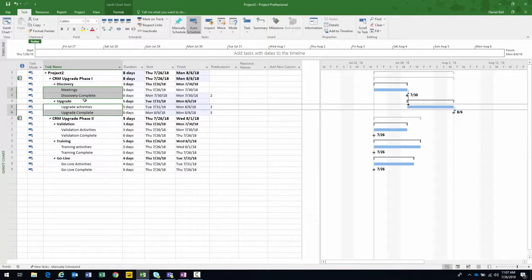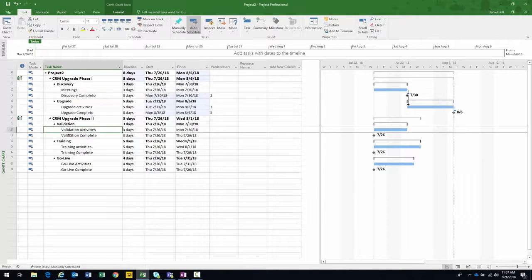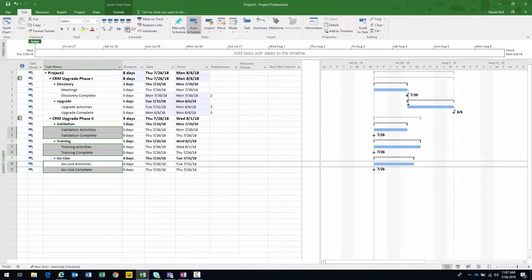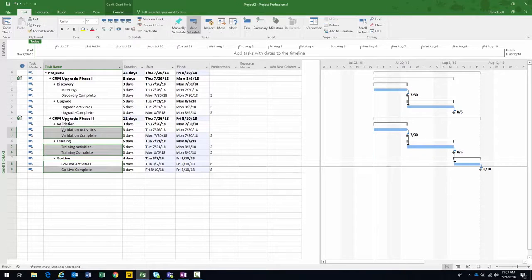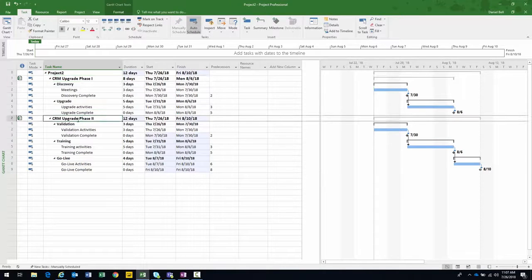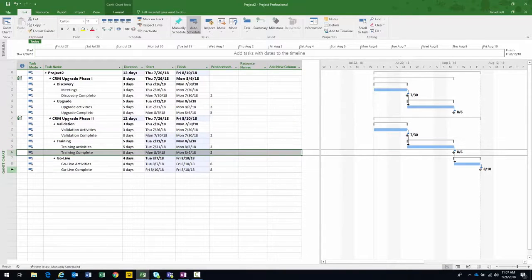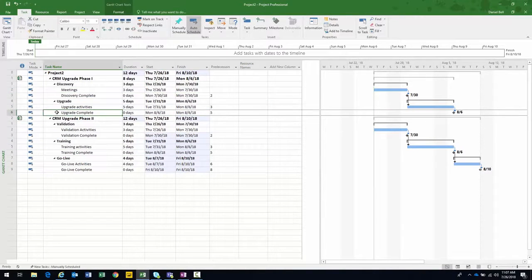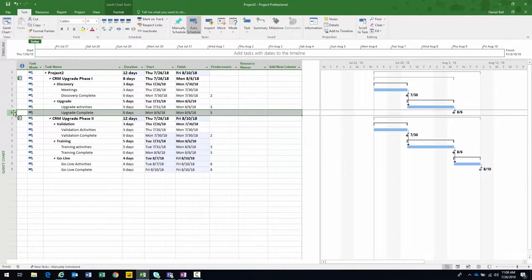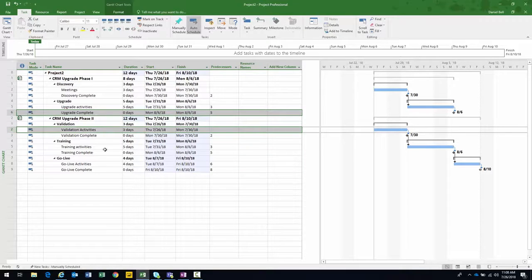It's a very simple example — finish-to-start relationships. I'll create links within Phase One by holding down the Control key and selecting the items continuously, then linking them. I could have done this with the projects open individually, of course. Now we have relationships created within the individual projects — CRM Upgrade Phase One and CRM Upgrade Phase Two. Next, let's create the relationship between the two projects using milestones that denote the completion of each stage: Validation Complete, Training Complete, Go Live Complete, Upgrade Complete, and Discovery Complete.